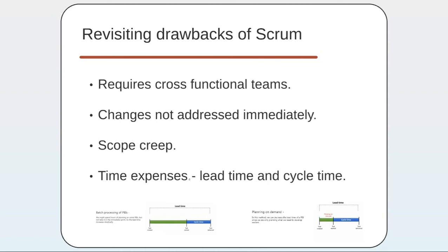And the cycle time is the time from when the developer starts working on a PBI until the QA person has declared that this PBI is done. So there's a small difference between lead time and cycle time. The ideal situation for a project would be the lead time being equal to the cycle time. But in the real world, since we do not have enough resources, we can't make that happen.